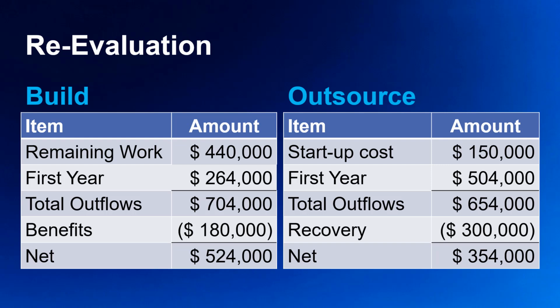You have provided the data that they need, and it does point to outsourcing as giving them the better deal. However, you have learned a lot, since you see that a lot of the money you have invested in your project, the sunk cost, has no bearing on whether to keep your project moving forward or not.